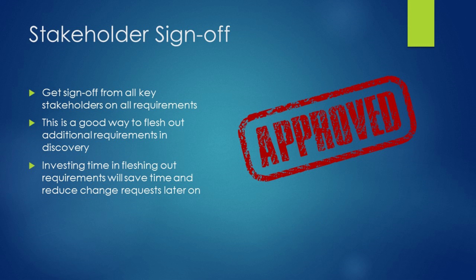If you've never had stakeholders do this before, you may be surprised at the number of requirements that get added or modified when you start asking them to put their signature on them and validate that they feel like everything has been captured. This can add significant time to the project at the beginning, but it will save you a lot of pain further down the line, as cleaner requirements will reduce the risk of scope creep.